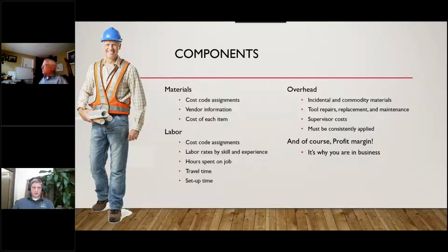For example, in Oregon, we have the Bureau of Labor and Industries, BOLI, which on their website publishes twice a year updated prevailing wages in a PDF. I'm not sure about other states. It's relatively easy to go and grab it off the website and take a look at it. Ours is about 30, 40 pages, and you can zero in on your tile setters and your framers and your plumbers pretty quickly and get the prevailing wages for the type of work they do.